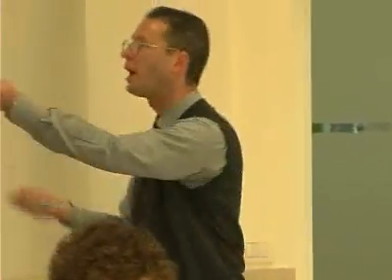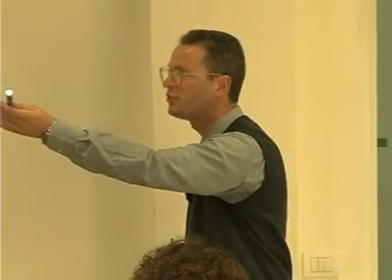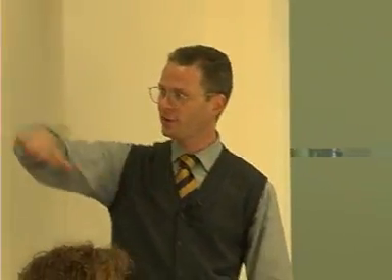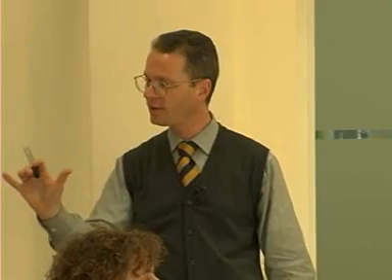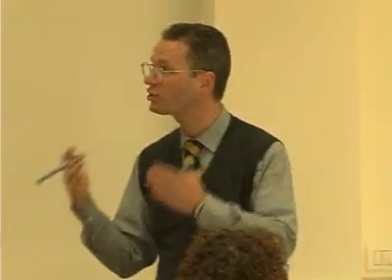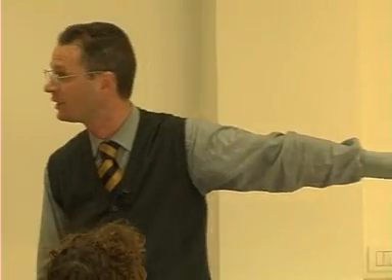Sufficiently clear? Question. So the scheduled repayment of the bank facility depends on the scheduled repayment of the bank. It's exactly the question that I posed to you before. It is exactly this the problem. The problem is, very simply, if the project performs very well, in a very short period of time, the scheduled repayment will be very strongly accelerated, because the amount of revenue is so powerful that you can recover quite easily the amount of cash in order to repay the VAT facility.